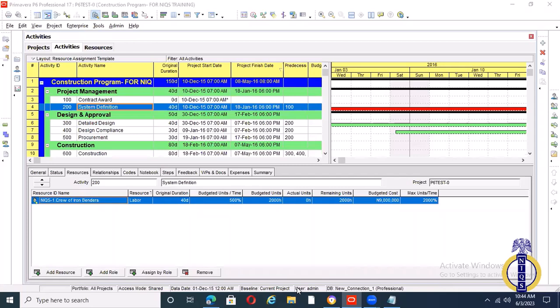Now that's $100, I'm going to split it. $70 will be paid in dollars direct to one bank account, one international bank, or what have you. Then 30% of that amount will be paid in Naira. Whatever the official going exchange rate is, is what they will use.